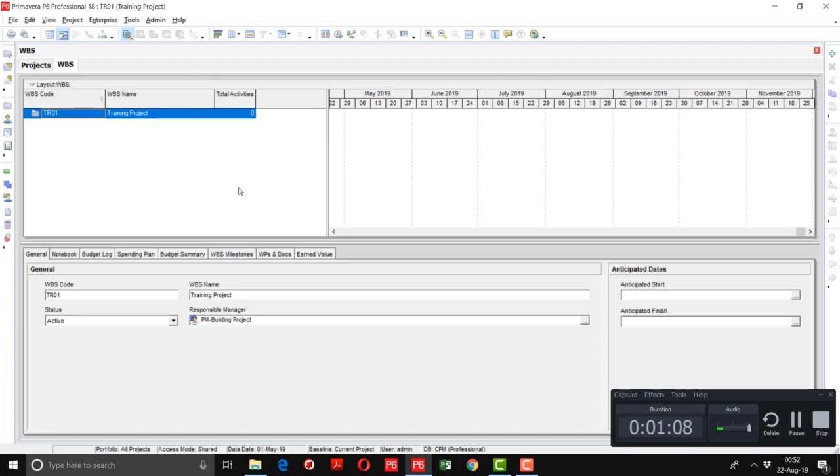Here we have to divide the project into sub levels, into smaller manageable packages. For example, we have a project in which we have planned engineering, procurement, construction, commissioning. So it means that our project is EPC. So first of all, we have to be familiar with the scope. Depending upon the scope, we can define the WBS. For the definition of the WBS, we should read the BOQ and drawings so that we can divide the project into appropriate areas, disciplines, zones, etc.